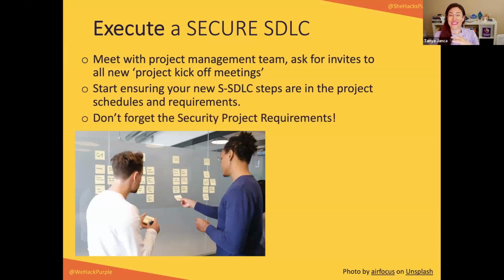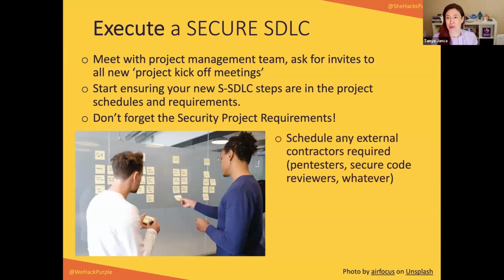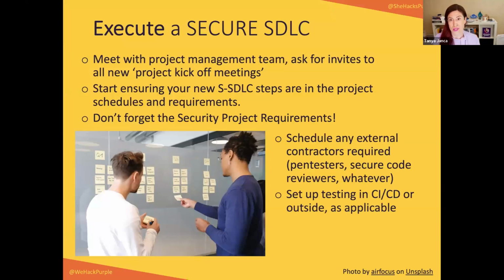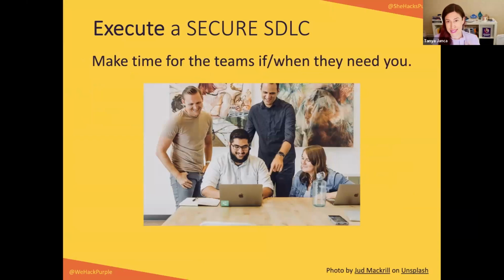Your security requirements are part of the project. I try to do the scheduling of external contractors. So if there's a pen tester or something like that that you need to hire, I try to have a pre-existing contract ready, and I try to schedule that and make it easier for them if I can. And then I set up any testing that I'm planning so that it's automated and ready for them. So they're not saying, oh, Tanya, we need that next week, and then I'm not ready. I try to make time for the teams to check in with them.